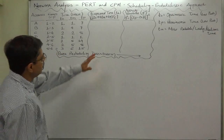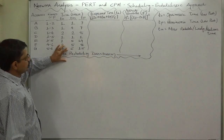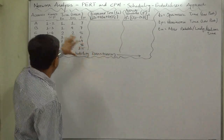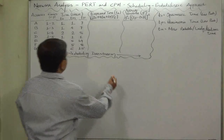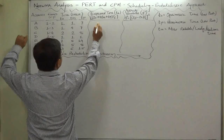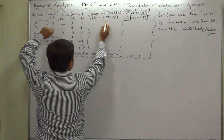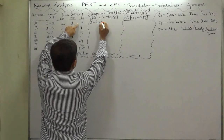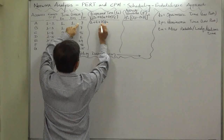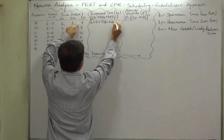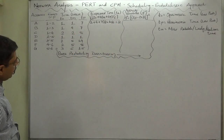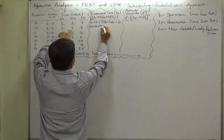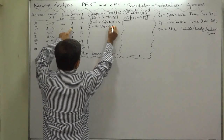Let's calculate first the expected time, and then on the basis of this distribution we can also calculate activity variance — the variance of time for each and every activity. For the first activity: TE = (TO=1 + 4×TM=4 + TP=7) / 6 = (1 + 16 + 7) / 6 = 24 / 6 = 4. For activity A: TE = (1 + 4×1 + 7) / 6 = 12 / 6 = 2.